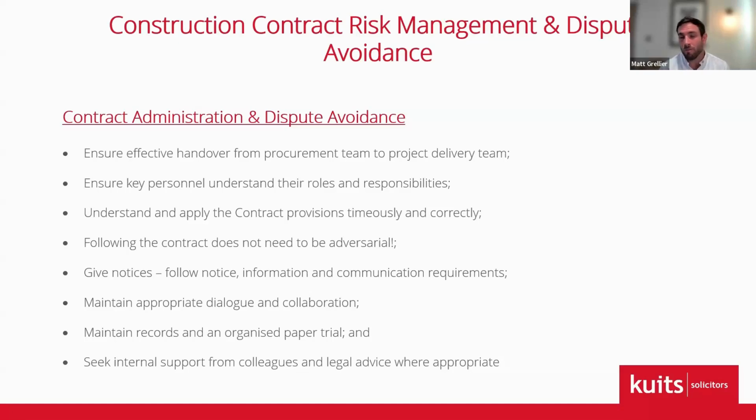For example, there can be very grave consequences for an employer client that fails to properly follow the payment provisions under a construction contract as regards the giving of payment notices and pay less notices, in circumstances where they want to pay less than the sum that's been applied for by the contractor. Crucial to follow the notice, information, communication requirements strictly. If the contract says send that notice with a pink ribbon on it by horse and cart, then do that. In dispute scenarios, parties often take very technical arguments around the method of service and the form and the content of notices.